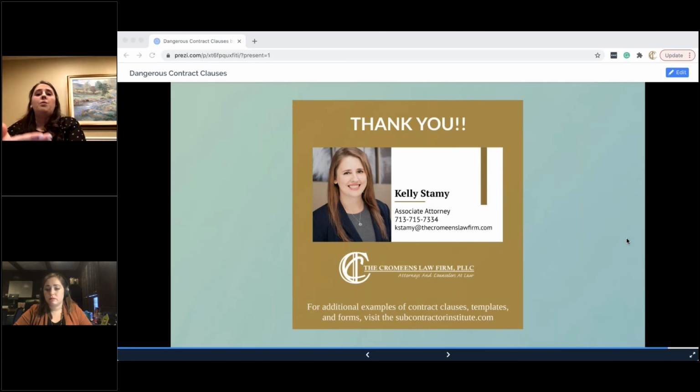Now it would depend on what you signed your contract in. Was there a situation where we're able to go in and add a clause that gives you extra time if additional land issues come up? So this is one of those situations where we can add preventative clauses to your subcontract. Again, this is specific to only certain trades, right? An electrician, the drywall guy, they don't have these types of issues.